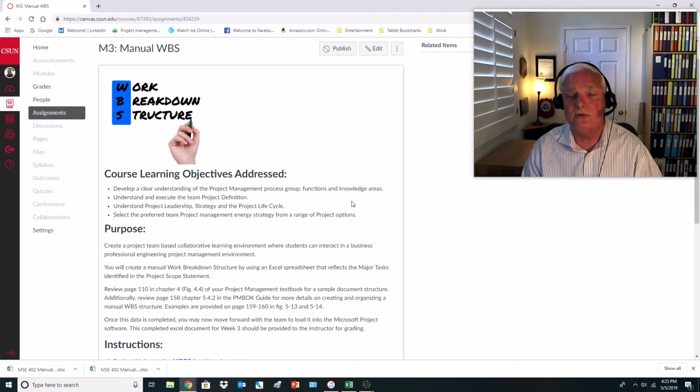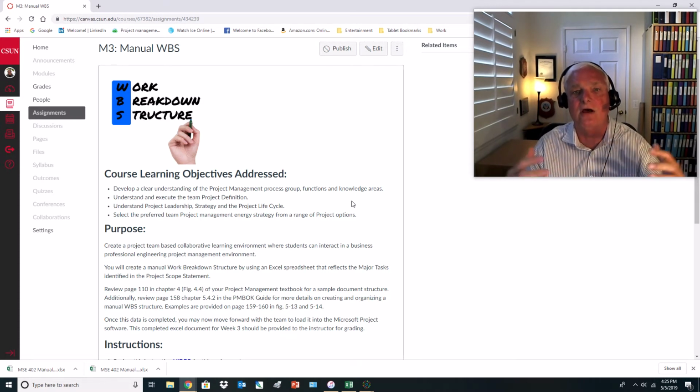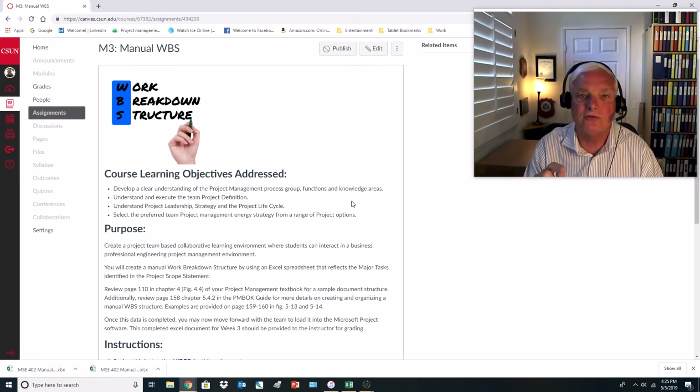This is also another one. As the team leader, you should probably separate this out and break it down for people to fill in the major tasks or subtasks, other people on the team. Delegate this out. Hand the requirements analysis off to one person. Hand the feasibility study off to another. Hand the procurement side of it off to another. The testability side off to another. Identify for yourselves, once again, what you think those major tasks or subtasks are associated with that.